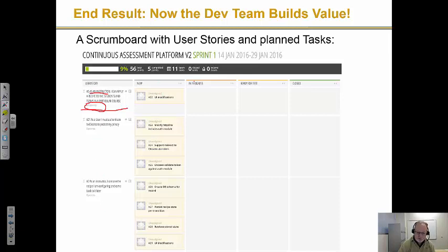Now, what are these things where it says new, in progress, ready for test, and closed? In detail, new means these are new tasks. All right, so these yellowish ones are tasks to do, and they can be written in a way that the developer understands what it means. So to do this story, we need some UI modifications. To do the one, as a user, I must authenticate to the CSS system to protect my privacy. Okay, what does the team need to do? Well, we've got to go in and modify HVD to include the auth module. We've got to support a redirect to CSS via a token. We've got to validate the token against the auth module.